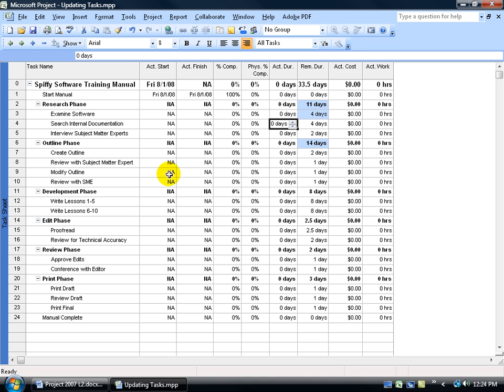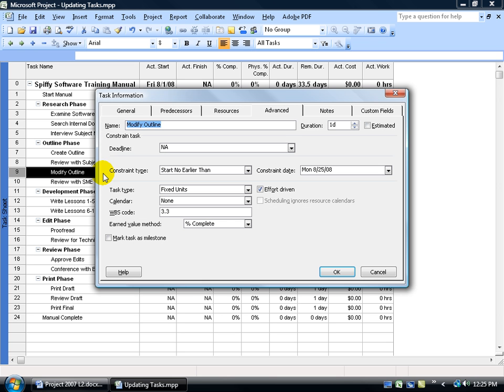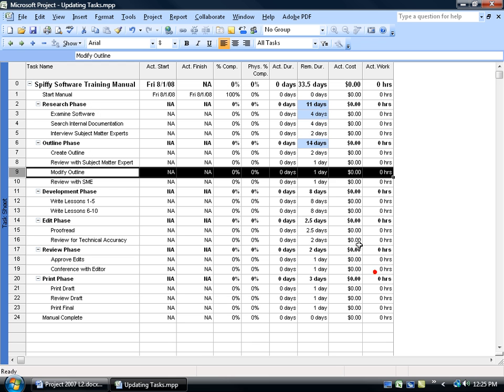Well, remember we have a task constraint here on Task 9. Let me double click to open it up and you can see here on the Advanced tab that we have a constraint date of no earlier than August the 25th. So what's happening...